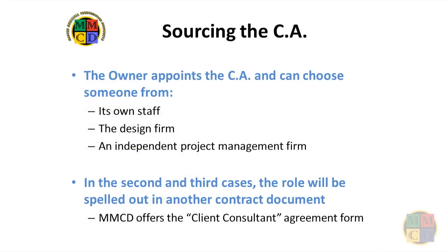One thing I've not mentioned is who can be a CA. The answer is that the owner can appoint a CA from its own staff, from the design firm, or from some other independent third party. MMCD does not make any recommendation about which source the owner should use because every situation is different.